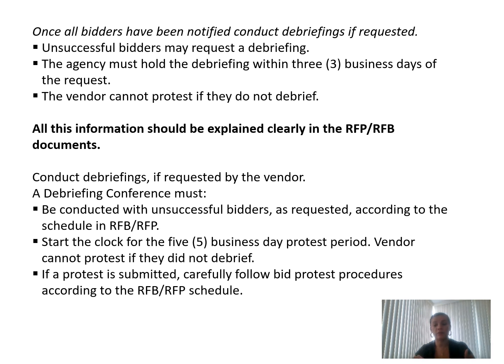Start the clock for the 5 business days protest period. If a protest is submitted, carefully follow the bid protest procedures according to the RFP and RFP schedule. You should be defining your company policies to handle the debriefing and doing that politely, because those should be potential vendors for another bidding request.